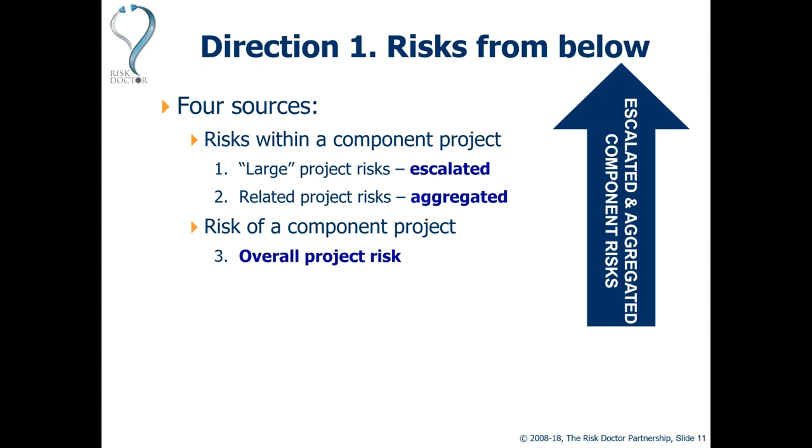And again, this is something which is explained in the risk management section of the APM Body of Knowledge, that's section 3.5, that there are two different concepts of risk, and we'll discuss this a little bit later on. There are individual risks within a project, and then we have the overall riskiness of the project. And if the project itself is risky, then that will affect our achievement of the project's goals, which in turn would affect our ability to achieve the program goals. So if the project itself is too risky, then that needs to be managed at the program level.